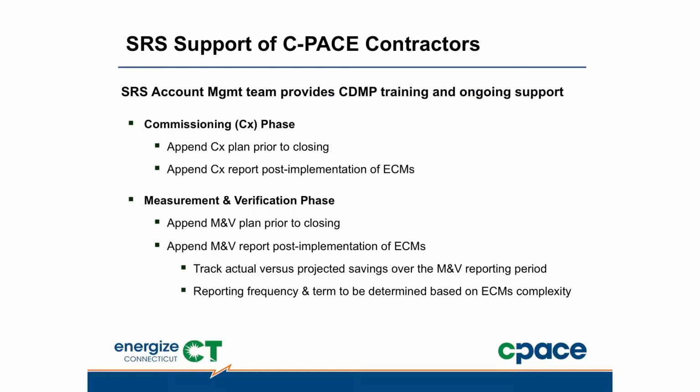If there are change orders in that process from financing approval to actually executing the installation, that's okay. It's just that they have to be documented, and those numbers may move around a little bit. But again, all of that has to be transparent. We have ways of doing that.